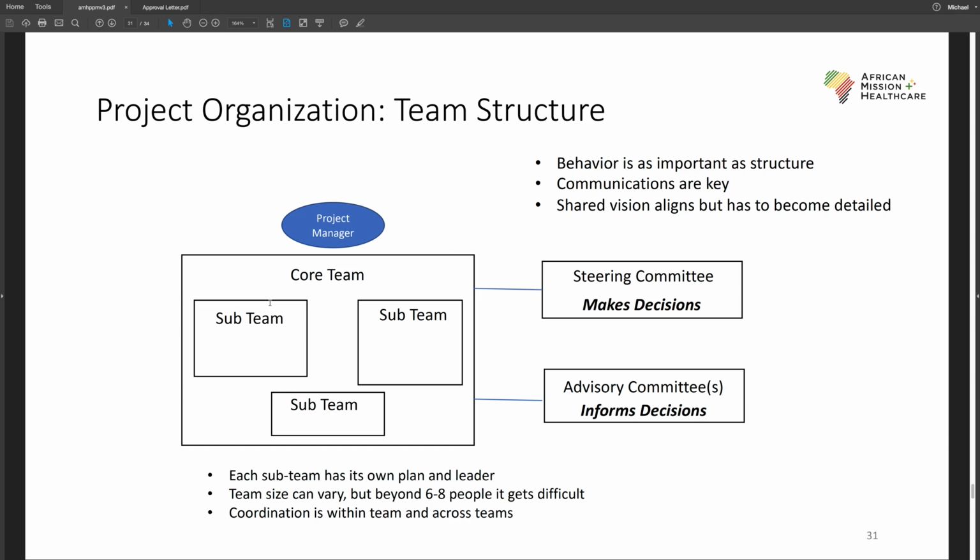Now, communications are key in a team structure. There are structured communications and informal communications. I like practices like daily, weekly, monthly status reports, where each sub-team and each person on the sub-team fills out something very short that lists here's what we accomplished, here are issues we have, and here's what we're going to be doing in the next period. Each member of the team and each member of other sub-teams takes the time to familiarize themselves with what's going on on a project-wide basis. A lot of times that's done in a meeting where people give the highlights of their status reports, at least at a sub-team level, to the entire project team. That's a structured way of enforcing communications.